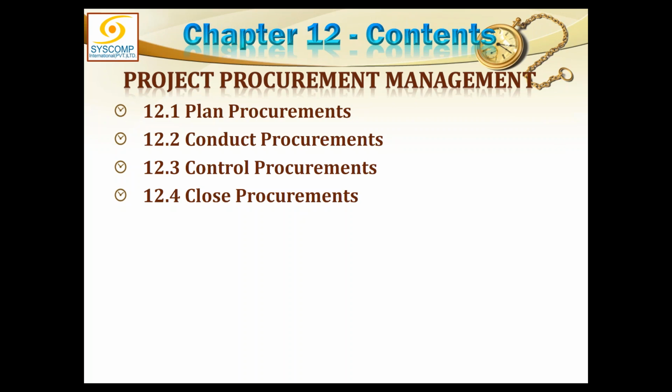And it includes advertising in the newspapers, conducting the bidder conference, receiving the proposals, evaluating them, interviewing them, getting their presentations, ultimately selecting the shortlisted contractors, and then ultimately awarding it to the one after due negotiation and contract. So this is what is done in conduct procurements.